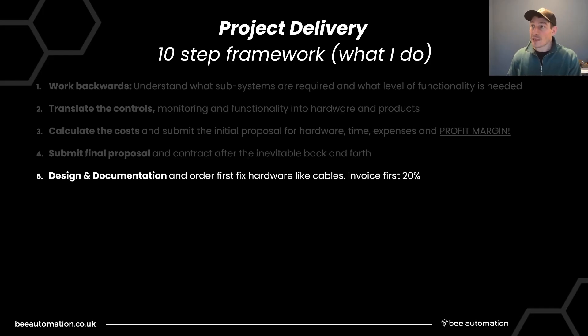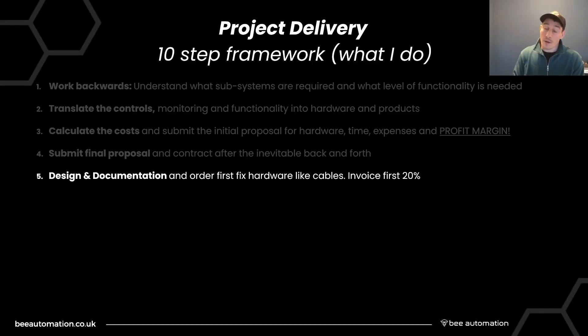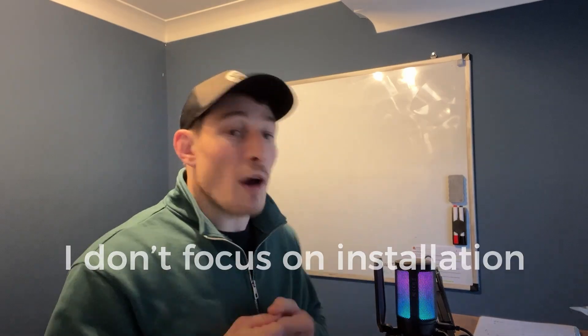Once you've got the green light on the project, step five is where it gets exciting: design and documentation. Before starting this phase, I invoice the client for around 20% of the overall project cost. Percentages may vary depending on your preferences, but this is typically when I charge before beginning design and ordering first-fix materials like cables. This is where the design and documentation really starts — making it much more professional and detailed.